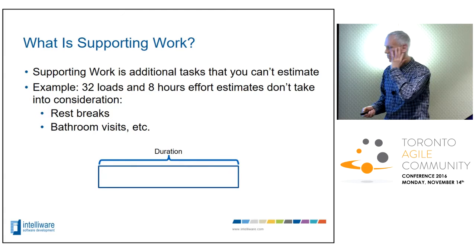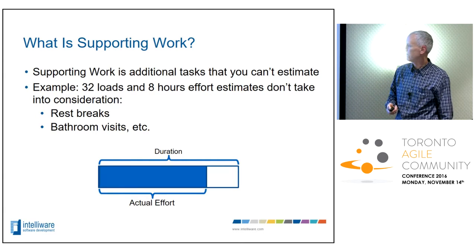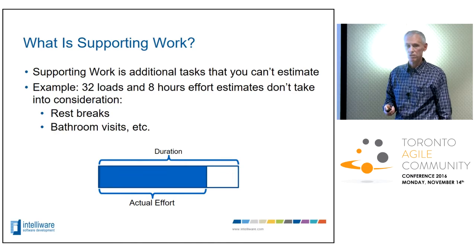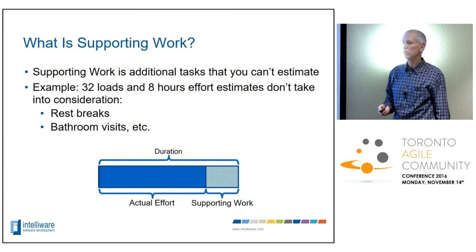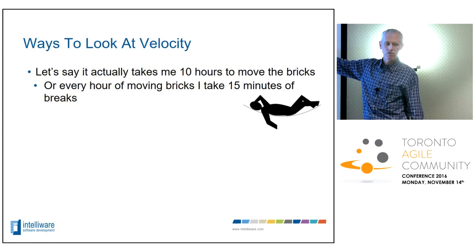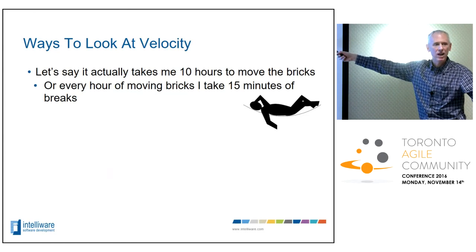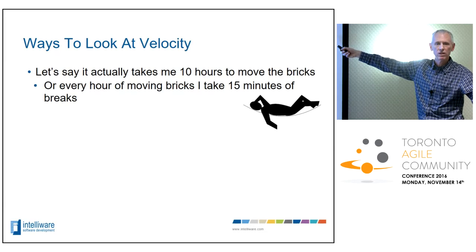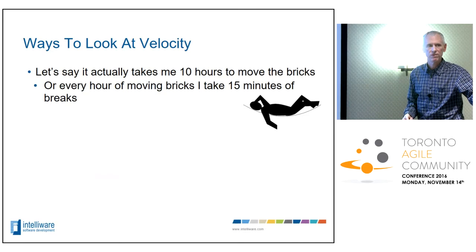So the duration to complete something is actually made up of 2 components: the actual effort, so that's your 32 loads or your 8 hours, and your supporting work. So if you keep that in mind, then this is me after I've done 4 loads. Let's say it actually takes me 10 hours to move those 32 loads of bricks. That means that basically every hour of moving bricks, I'm going to end up taking something like 15 minutes of breaks.